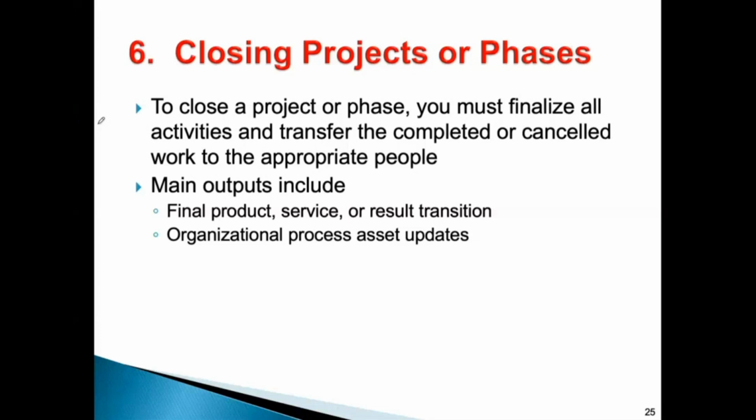Now, if you completed a system, an application, a financial system, let's say, then this is added to your assets. Remember when I explained this in the beginning? This is called an asset, okay? So you have to include this in your assets. You update the assets list, okay? And one more thing here that's not mentioned is the lessons learned. You have to document the lessons learned. Throughout this experience, you face some challenges, some troubles. You need to document them and document how you resolved these. This will help you in future projects, or it will help your colleagues in the organization if they are doing a similar project.